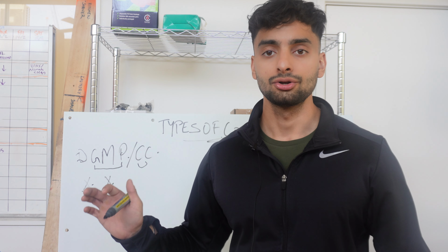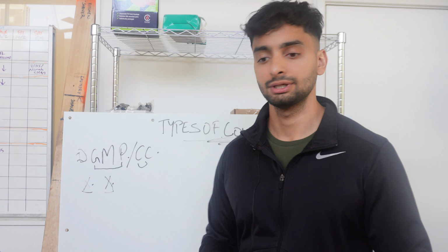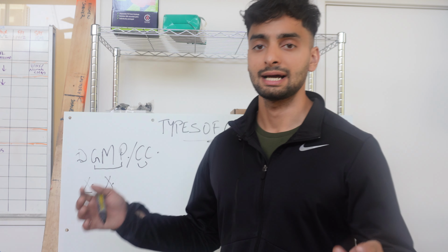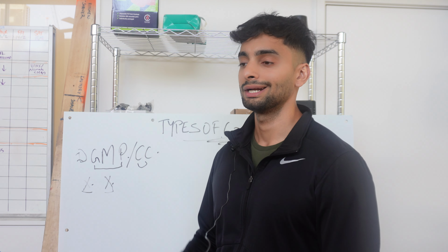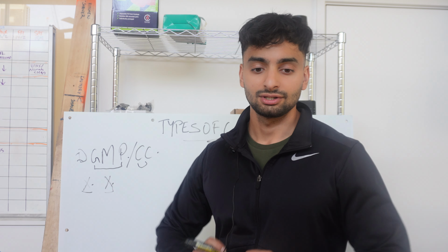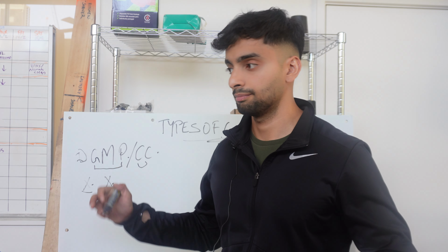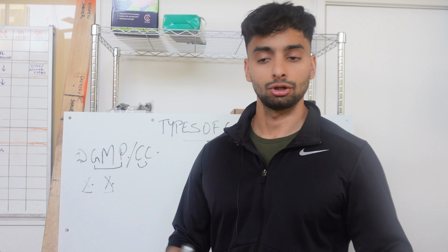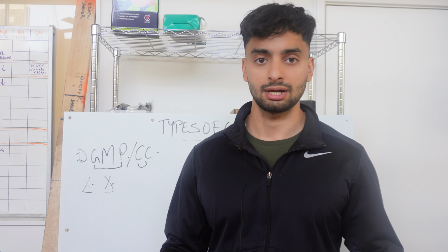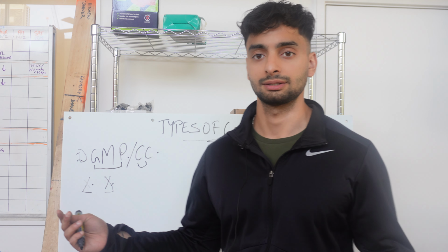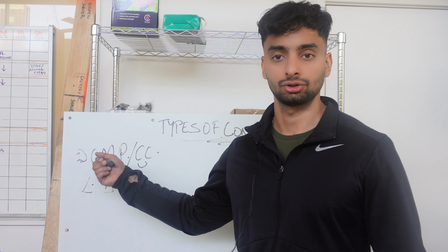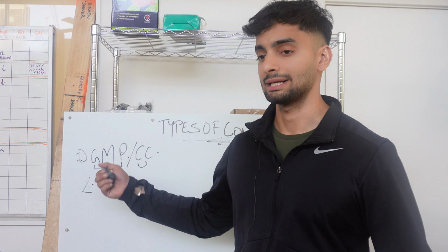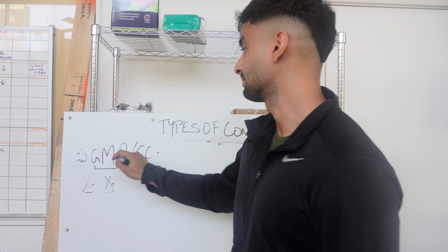If it does not go over and the project finishes in a really good and sufficient time and also at less cost, then that saving goes into the pocket of the contractor. Now, this is a very generic nature of this contract. There are a lot of negotiations behind the doors, so there would be some developers looking at this going, oh, that's not true. It's actually the generic form of the contract, and you can negotiate other ways to do it within this contract, but that's what guaranteed maximum price means.